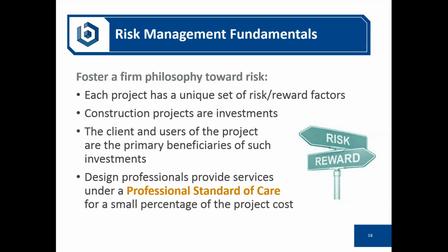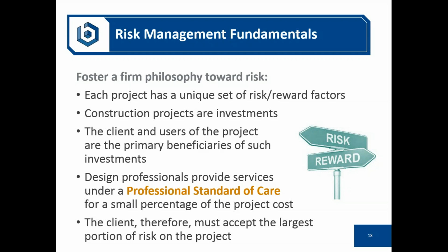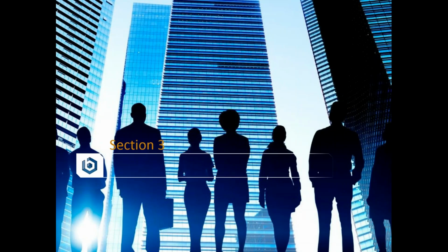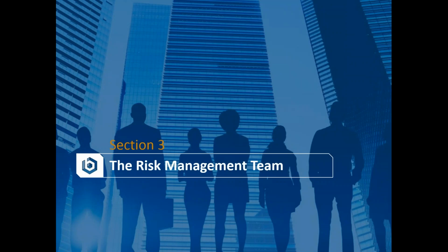And as a result, clients need to understand that you're providing your services under a professional standard of care. And that professional standard of care is not perfection. And while you are a component of the owner's risk management team because you have been selected based on your skills and expertise in that project type, it is the owner's responsibility to pay for the project and to accept that risk on the project. That's why owners need to have contingencies from the beginning of the project in their project budgets and maintain those all the way through the end of the project.